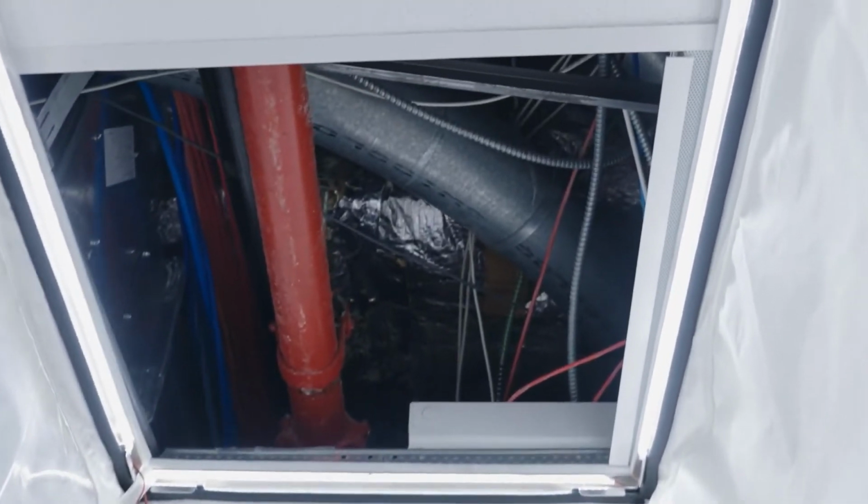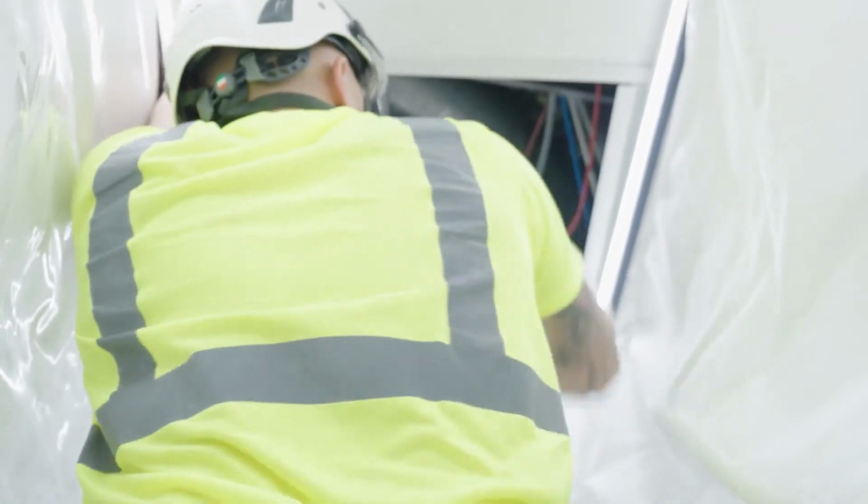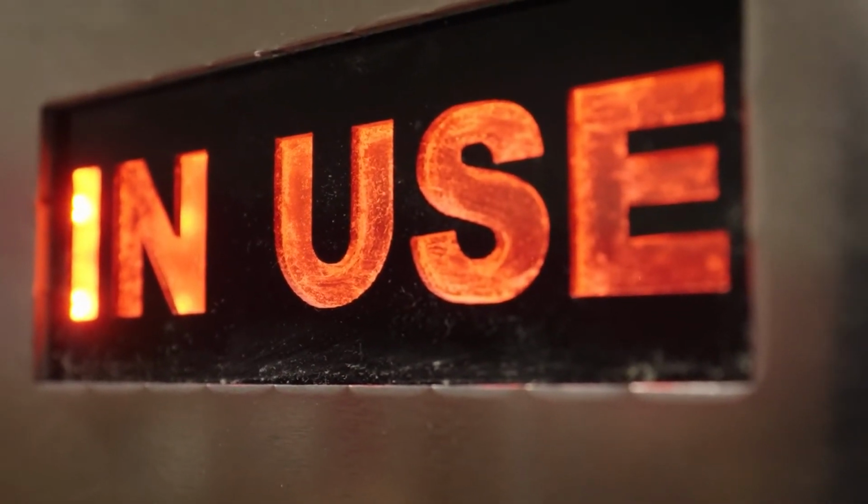In a hospital setting, simply removing ceiling tiles can create a health risk to some patients. Above ceiling work may lead to exposure to dust and potentially hazardous fungal spores. To help minimize this risk, all work above the ceilings requires an above ceiling work permit issued by engineering.